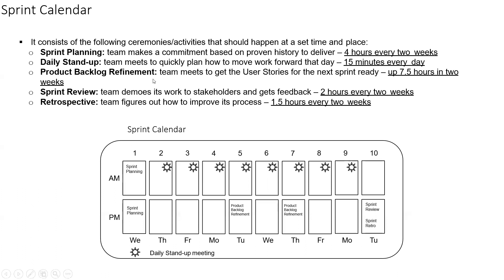Another event that we have learned is product backlog refinement, where the team gathers to make sure that they are ready with the list of user stories to be taken for the next sprint. In the product backlog refinement meeting we are preparing ourselves for the next sprint. It is scheduled by the product owner — it is the responsibility of the product owner to conduct this meeting. It can be planned one day within a sprint or separated across two days based on what the team has agreed. The product backlog refinement meeting should not take more than 7.5 hours in two weeks.